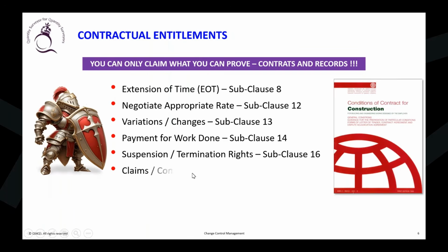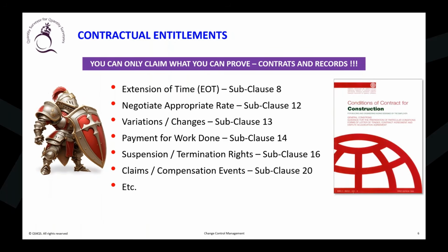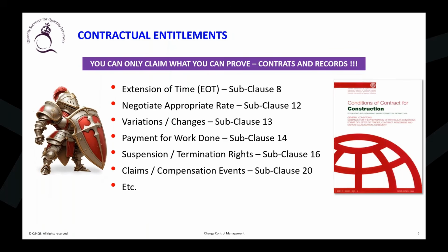Learning all the subclauses, including the claims, subclause 20. There are so many other subclauses also connected when it comes to a variation. For example, insurance. Many people don't know that if a variation is introduced, insurance will also be impacted. Without knowing the contractual entitlement, you cannot be a proper QS. And if you want to grow, this change control management process, which means the variation process, is not really as simple as what we are seeing in real practice.